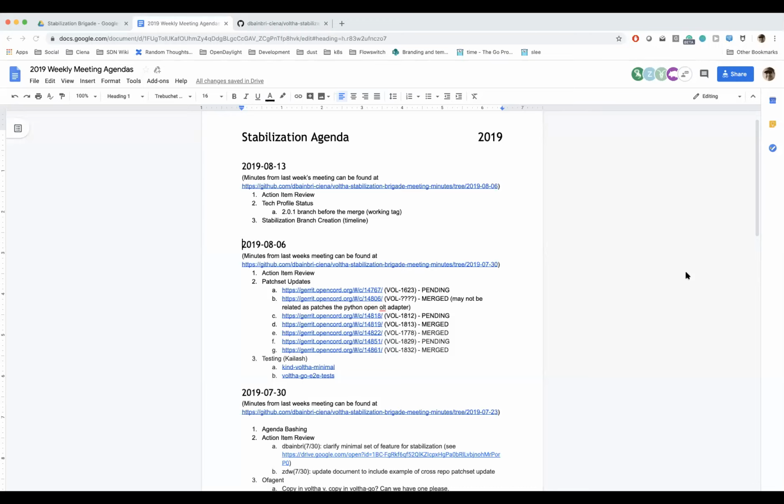Well, this is the question. Can we say, hey, look, we're going to merge the 4 or 5 outstanding patches, and then we're kind of at a code freeze until we get tests around TP and eventing done and merged in? In other words, don't submit a patch set. Right, or we'll sit on it. That's kind of been what we've been doing so far with the few that are out there. To be honest, I've just been sitting on mine, expecting this big tag and merge to happen.